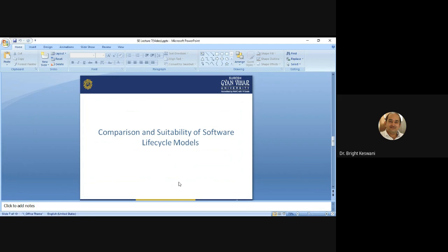Then we will discuss the incremental life cycle model. This model is similar to the waterfall in many respects, but it differs in that it produces some tangible results to the customer sooner. The initial processes of system requirements and feasibility, software requirements, and general design are done in sequence once for the overall project.